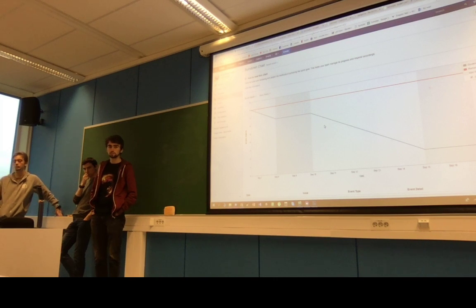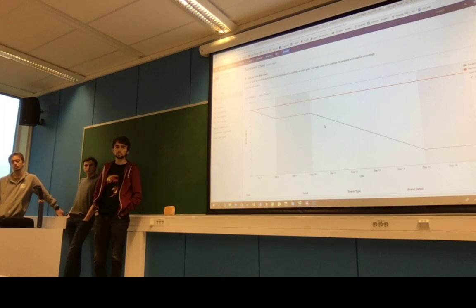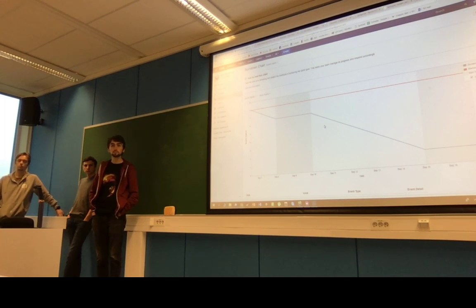Yeah. So it's up to you. Of course, you can play with it. There will be some fuzziness. Not everything is very strict, right? So a task which has, let's say, one story point, sometimes it's going to take 2 hours, sometimes it's going to take 3 hours. And that's okay, right? There is a bit of inconsistency between translating the hardness in story points to hours of how long it took. Also some tasks can be done by one of you much faster than by the other. It's normal. What matters is that you have some sort of consistency as a team, that every sprint you're doing a consistent amount of delivery. So you have to find that translation for yourself, for your team.